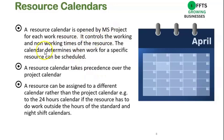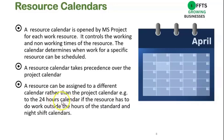Let's look at resource calendars. A resource calendar is opened by MS Project for each work resource — it controls the working and non-working times of the resource. The calendar determines when a specific resource can be scheduled. There is a project calendar with certain fixed hours of work, but a particular resource may be on vacation leave during the month. You need to have a resource calendar that shows when he or she is available — it takes precedence over the project calendar. A resource can be assigned to a different calendar, for example the 24-hour calendar if working beyond standard or night shift hours.